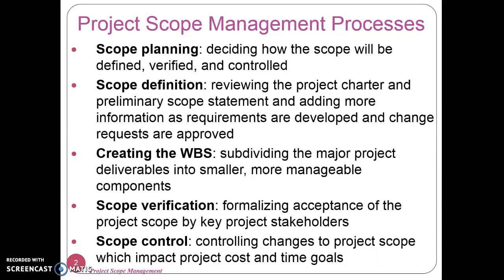Second, the scope definition. It simply says it includes all the information and requirement regarding the development phase and the client approval. The third and the most important part is WBS, creating the WBS. It means dividing your project into sub projects or sub modules. If your project is very big, take an example of Paytm. Paytm is a big project, but it is divided into subcategories like flight module, movie ticket, and other modules as well.